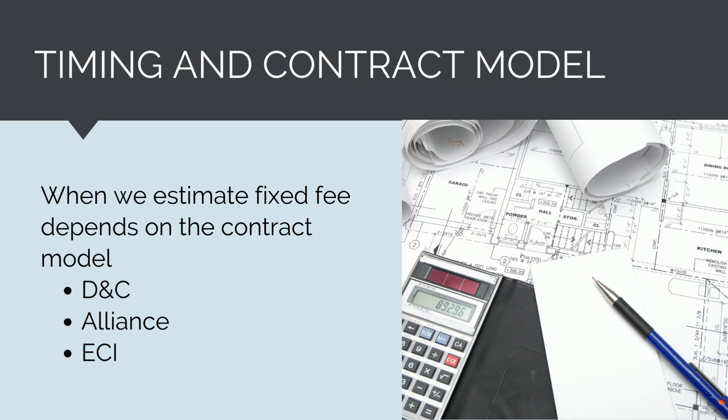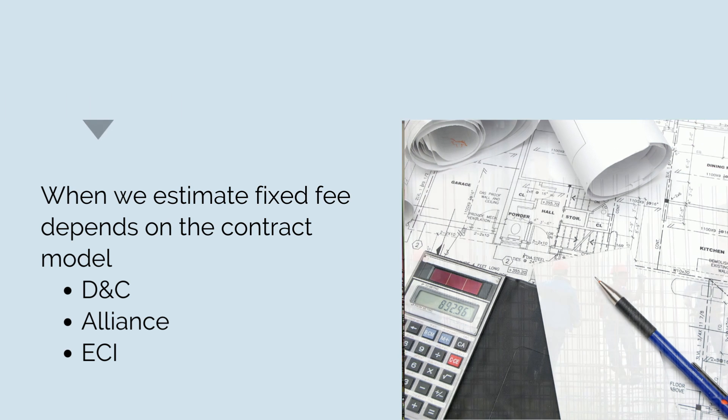Some forms of contract, like managing contractor or cost-plus contracts, don't require us to estimate a fixed fee, as we're simply paid for the work we complete plus an agreed-upon profit margin.